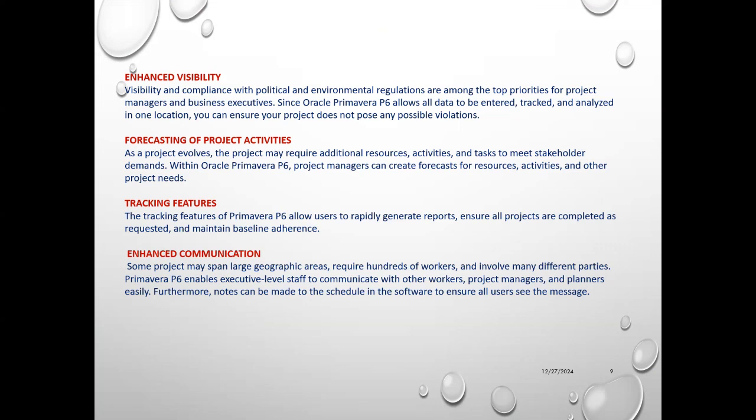And who is responsible for that? You find that this is the responsibility of a subcontractor or a third party, or you find that everything is going fine. You are doing very good. Your subcontractor is doing well. Let's say I am the client because I work for a client. I am doing well. I have no delay from my end. My contractor has no delay from him. But this delay is coming from a third party. Maybe you submitted the design for authority approval. The design is not approved by the authority. Authority is sitting on the delay. So you can find that the project is currently at 3% delay due to this. So you can find all this information, which will help you to do the proper communication of the project progress to the various stakeholders. So it will help you to enhance the communication. Primavera is one of the important tools for that.